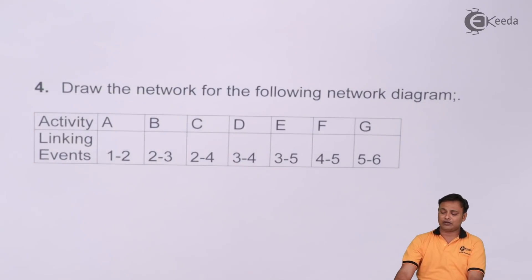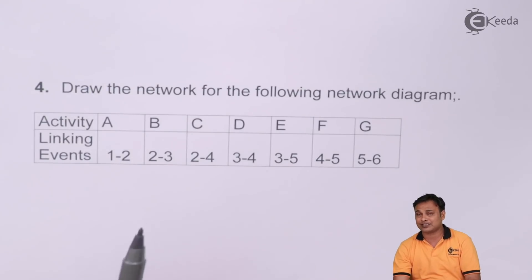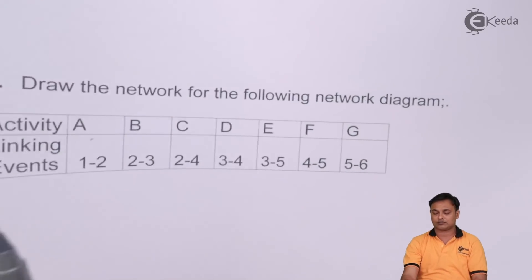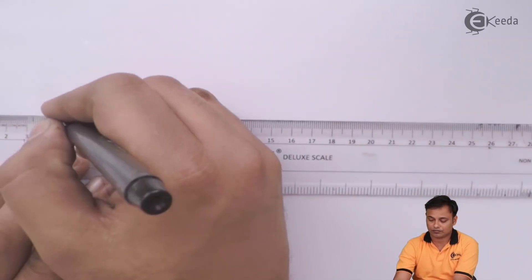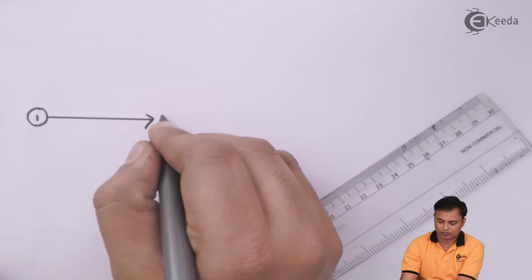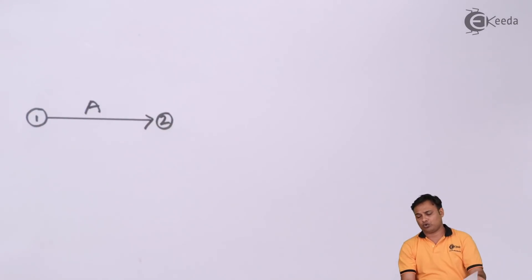Because this 1, 2, 3 these are the numbers that we normally use inside the nodes. So first I will draw 1 to 2 as A. This is my 1 to 2 as A.